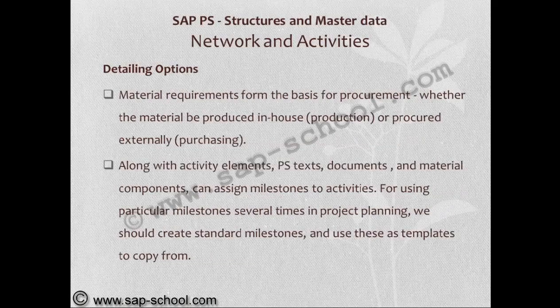Material requirements form the basis for procurement, whether the material is procured in-house or externally. That means production or purchasing. Along with activity elements, PS text, documents and material components, you can assign milestones to activities. For using particular milestones several times in project planning, we should create standard milestones and use these as templates to copy from.